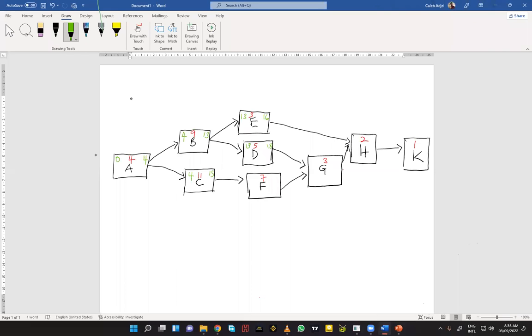This is just one activity. So this will give us 15, and 15 plus 7 will give us 22. This activity is linked up to this, and this activity H is linked up to G and E, but we should be able to calculate G before we can find its early start. So this is 18, this is 22, and the rule says when we are doing a forward pass, we pick the highest. So 22 will be here.